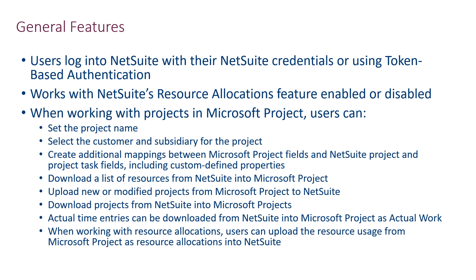As previously demonstrated, projects can be uploaded into and downloaded from NetSuite, and in either case you can download actual time entries from NetSuite, and they will be applied to tasks in Microsoft Project as actual work. Finally, if your company has the resource allocations enabled in NetSuite, project managers can fine-tune assignments in Microsoft Project and upload those assignments into NetSuite as resource allocations for the project.